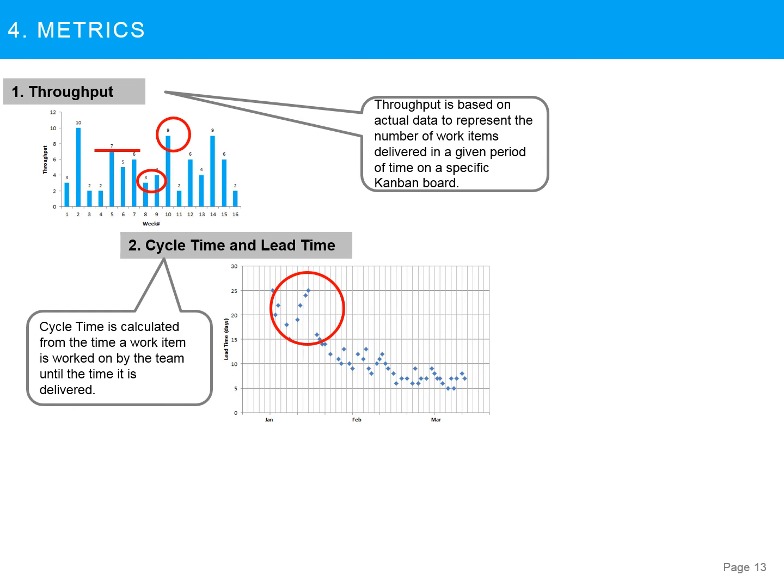One action probably is to increase backlog refinement. We may need to talk to the product owner, who may need to break down the user stories a little better, or maybe define clear acceptance criteria or definition of done. Somewhere over here, you can confidently say that the lead time is well controlled within 10 days. And later you can see that the lead time has come down to 7 days, which shows that the team is improving the discipline of finishing the work faster.